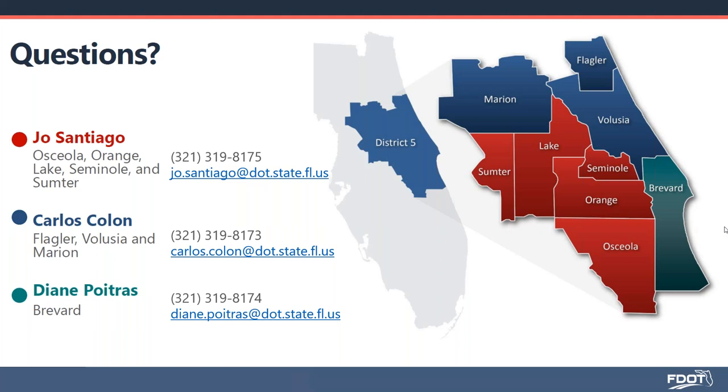Tom Wilder's question is, if we pay our fuel bill in March, but it may include some February expenses, will we ask for reimbursement in the March billing when it was paid? As long as you're not duplicating expenses from one invoice to the next. So if you had $5,000 in fuel expenses in February and you have some additional ones in March, just make sure you're not carrying over the same expenditures from your February into your March invoice. If you had an additional $2,000 in March, you would submit that. If you only submit a portion of your February expenditures with that invoice and need to submit the other portion in March, that's fine, as long as we don't see any duplication of expenses.